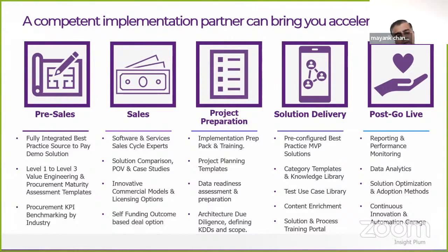So until you are done with project preparation, don't embark on the actual project kickoff and the solution design, the agile phases of delivery. So highly recommend go through the readiness, the architecture due diligence, proper meticulous planning, and then make sure your team is mobilized to actually deliver the project in the best available time. This way you will not only ensure timely delivery, but you will also really save costs, and it'll also help you define the right solution scope and the change impact of whatever solution you are bringing into the organization.